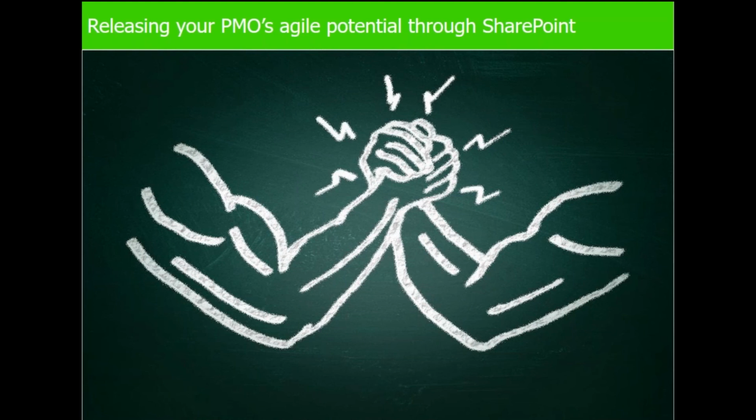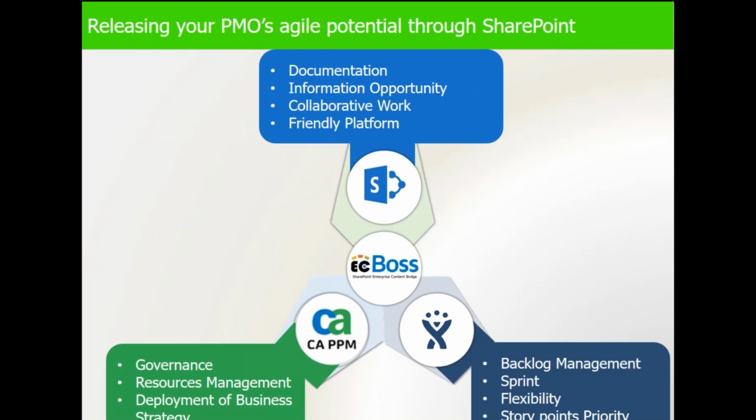Number 3, given the task assignments within an Agile team are dynamic, it is unwise to assign a resource part-time to an Agile team, as this breaks the self-organizing model. Instead, it's better to treat Agile teams as a unit and assign resources to them full-time, with the exception of resources such as technical architects or DBAs that are typically spread across multiple projects. And finally, regular reviews of Agile projects are more focused on working software rather than predetermined milestones or delivering project documentation. Reviews should be tailored to the type of projects to ensure they're valuable to the team.